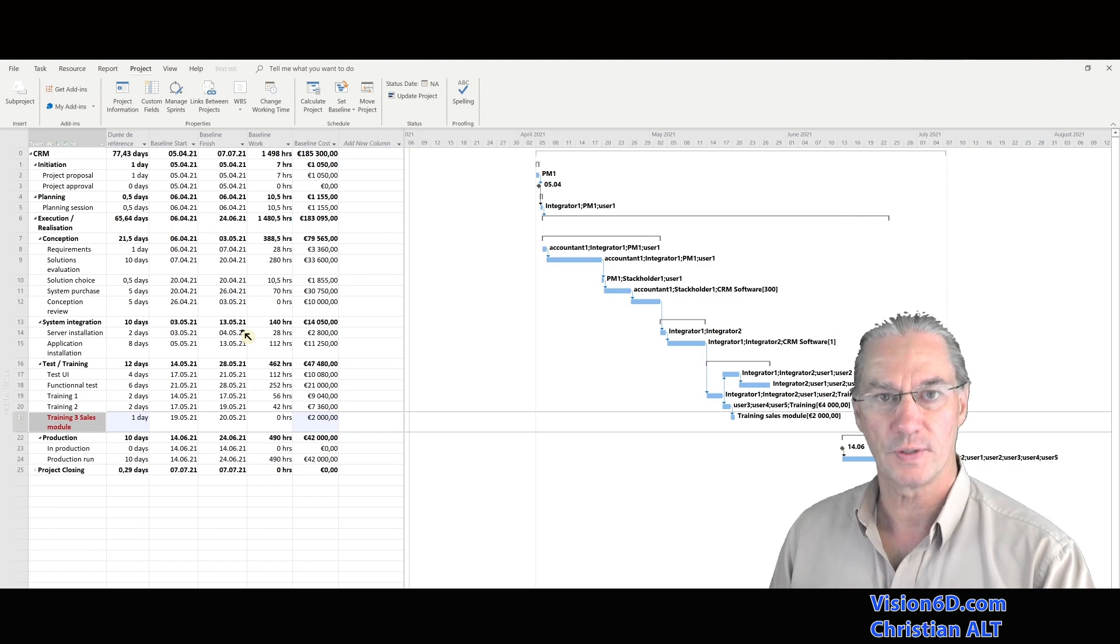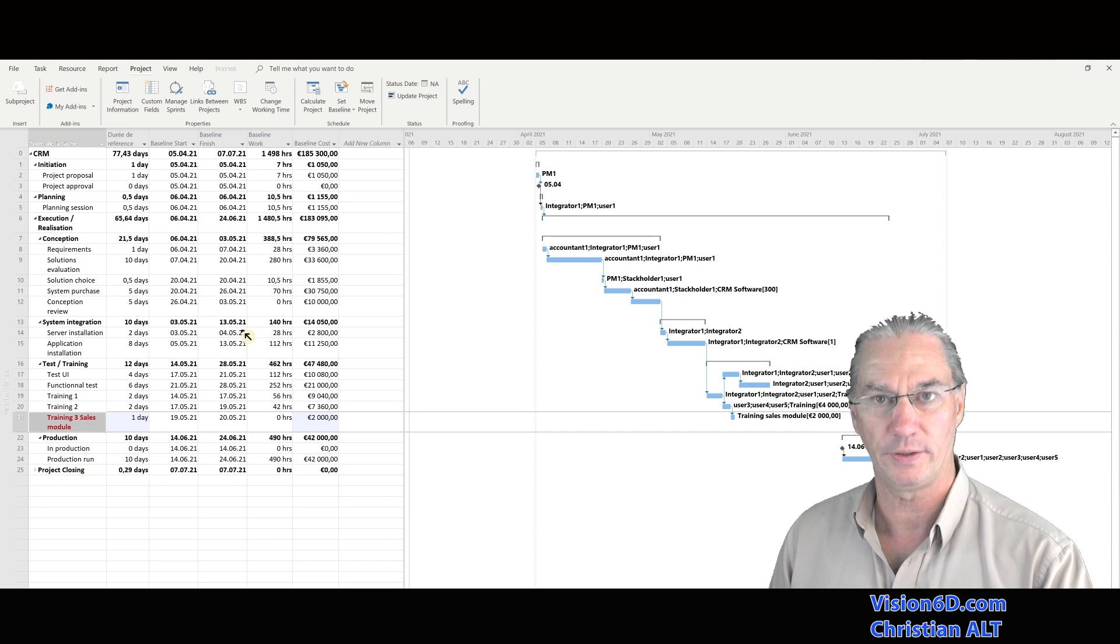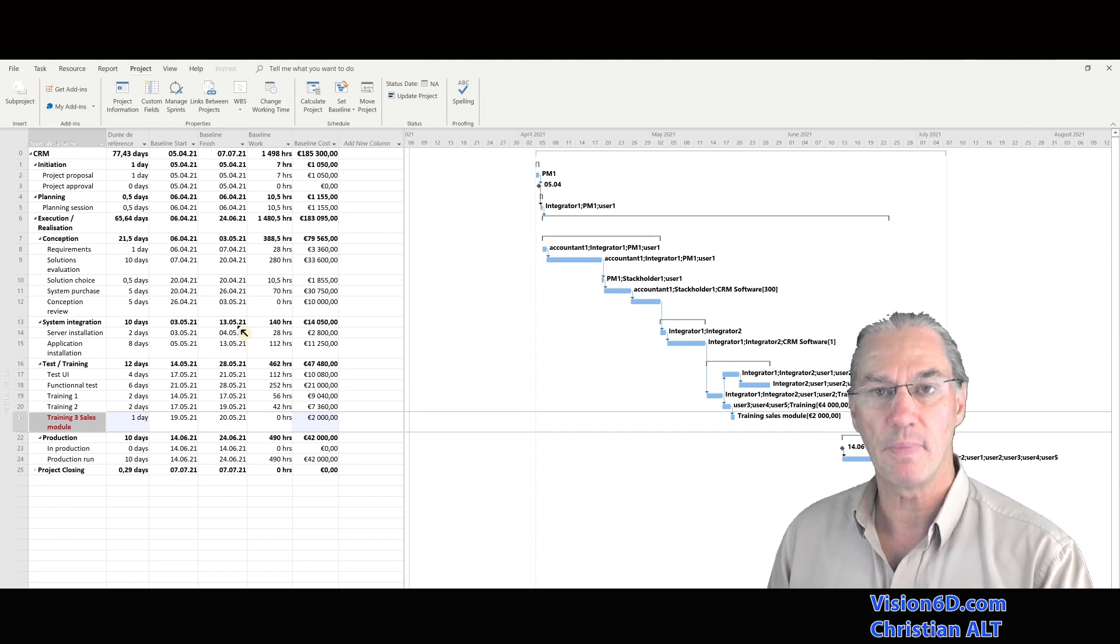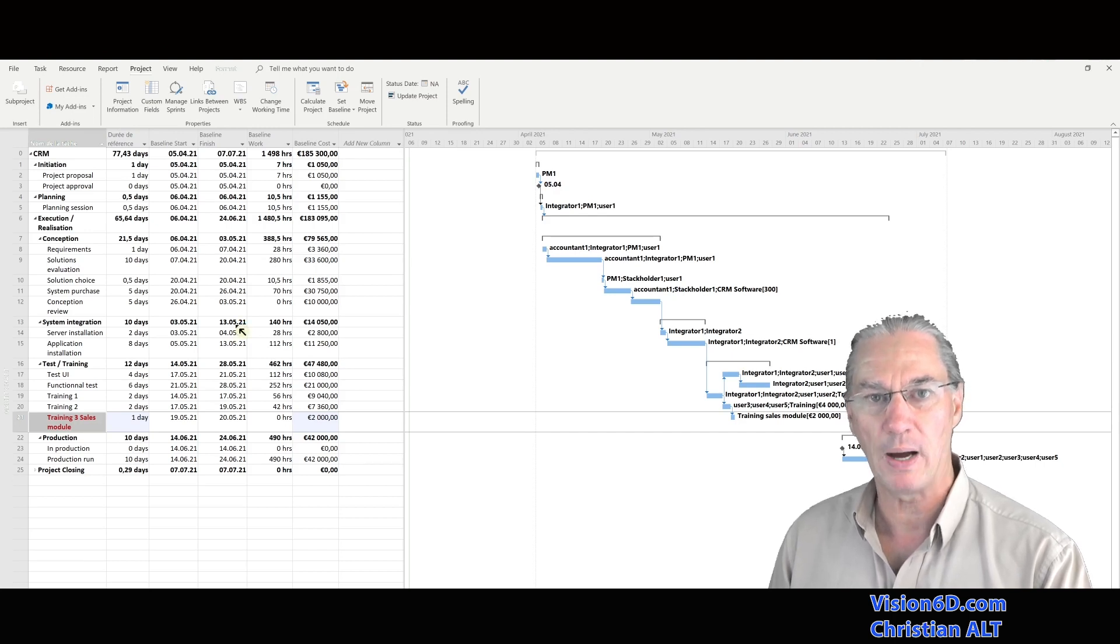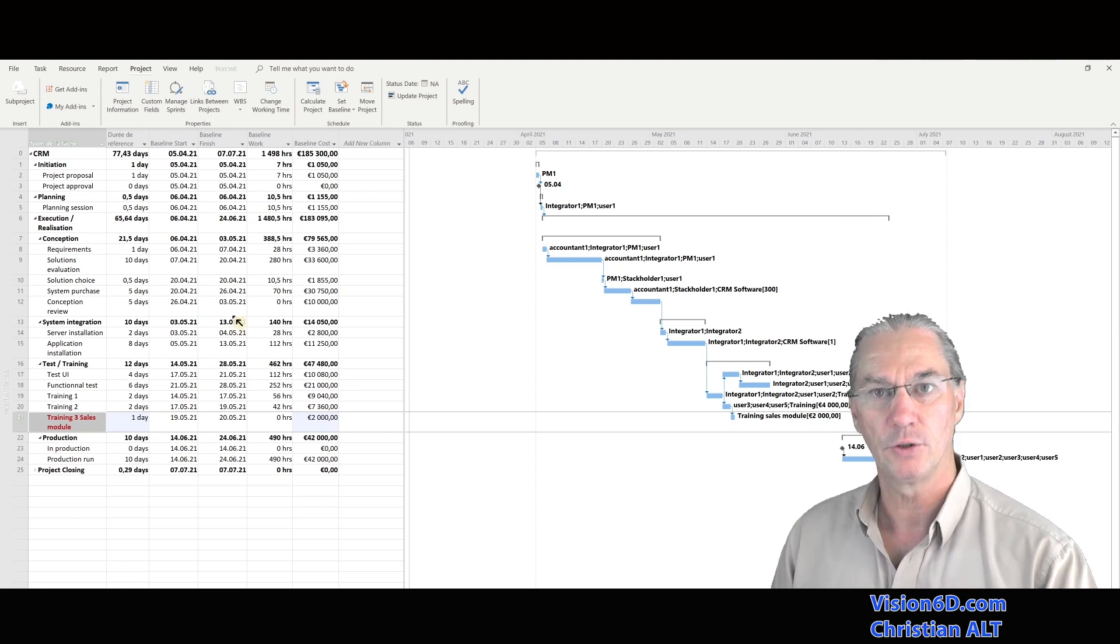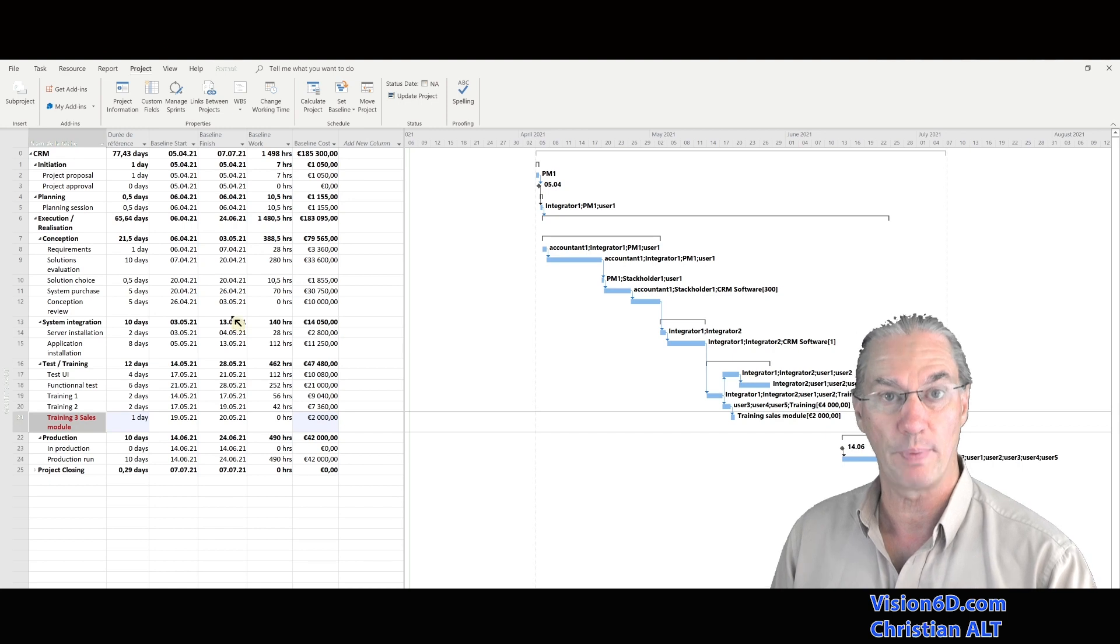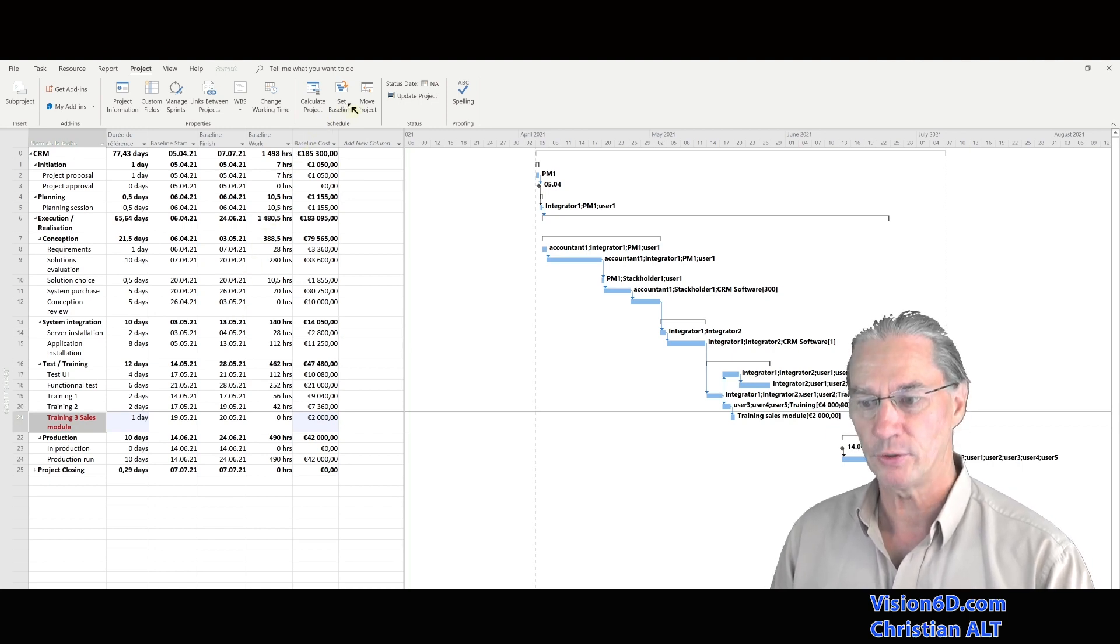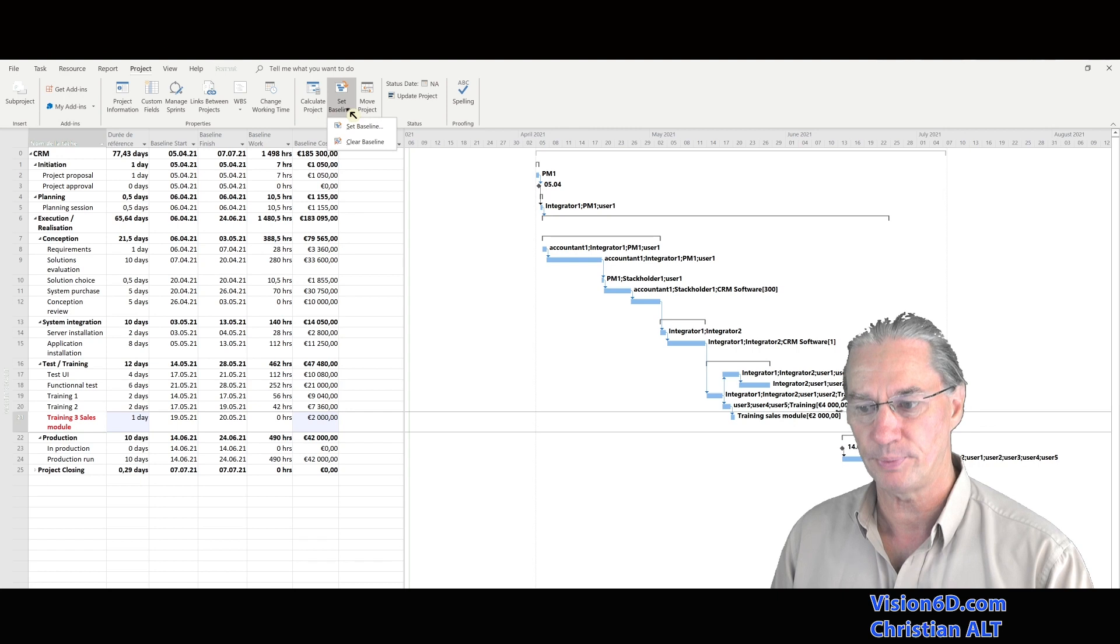In a project, there will be changes. So there are changes that are quite important and quite relevant in a project. For that, we might create a new baseline. And what we might be willing to do is to save the old baseline, to be always able to go back to that older baseline. So I'm going to show you how you can copy a baseline.